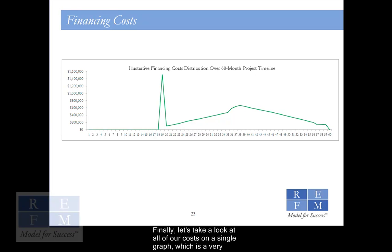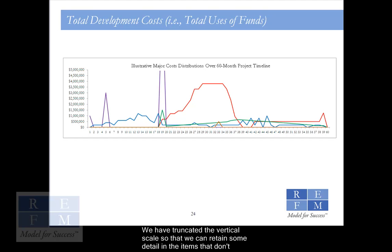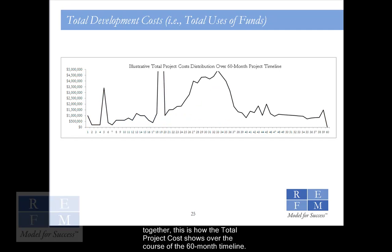Finally, let's take a look at all of our costs on a single graph, which is a very interesting and educational exercise. We've truncated the vertical scale so that we can retain some detail in the items that don't have as much in any one period. The purple line is our land, the blue are soft costs, the red are hard costs, the green are financing costs, and the orange are FF&E. Blending all of these costs together, this is how the total project cost shows over the course of the 60-month timeline.